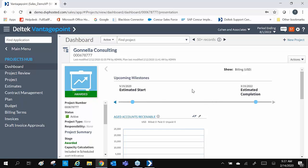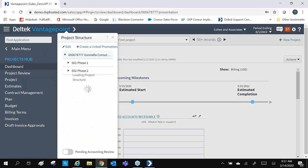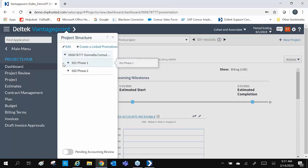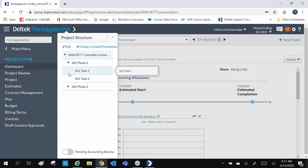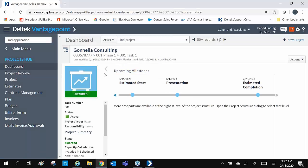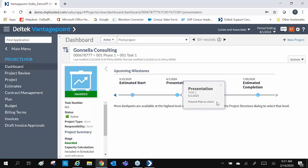Within each project, we can associate different levels. When we click on the project structure, we can see all project levels. We will call level 2 phases and level 3 tasks, but Vantage Point is configurable to your firm's language. Within each level, you can have separate milestones. When you click on the milestones, you can see any notes that were entered. This is a quick snapshot of the timeline for that phase or task.